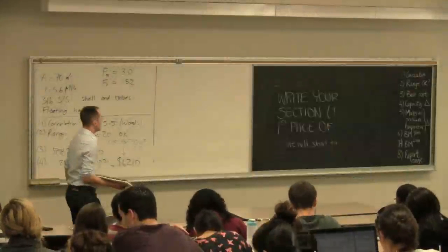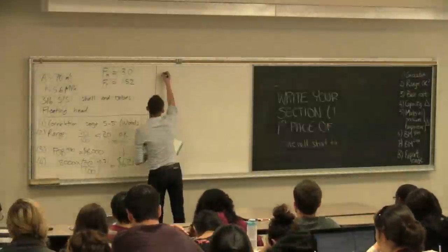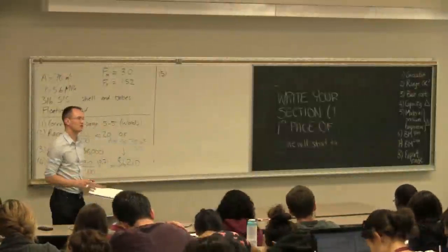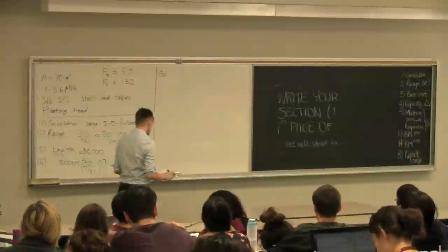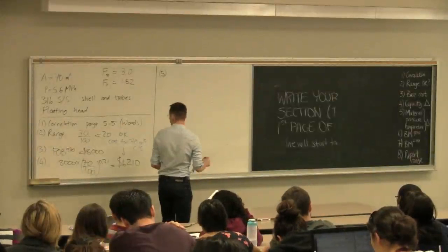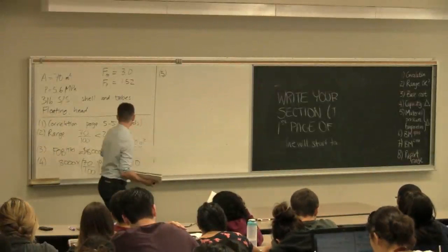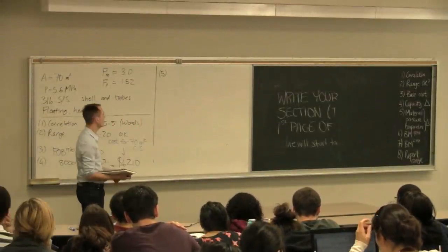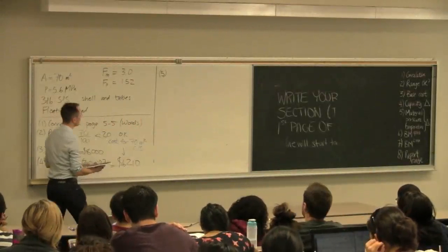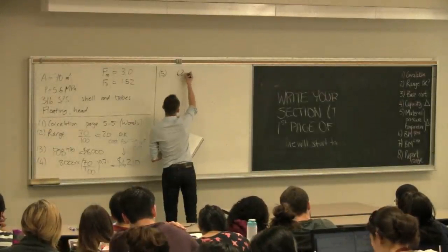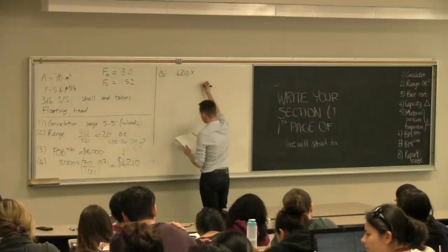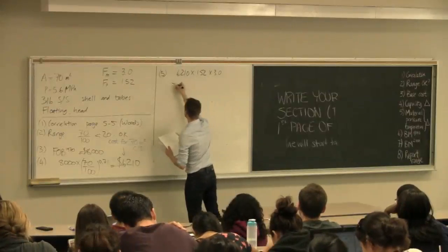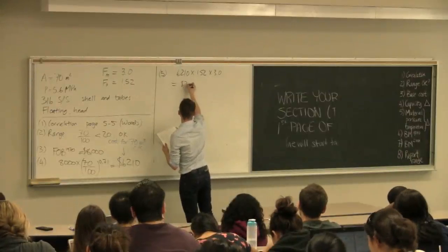Okay, so now step five. Please take a look here. This is important. The temptation is to do the following, and it's incorrect. One might be inclined to say, well, my heat exchanger at 17 meters squared, but made out of carbon steel, if I want to inflate it for higher pressure and for different materials of construction, the temptation would be to say 6,10 times 1.52 times 3, which gets you a cost of 28,300.